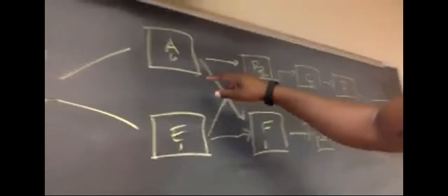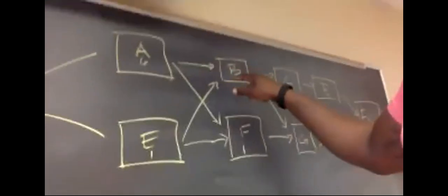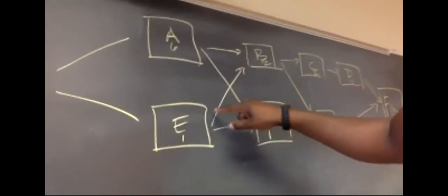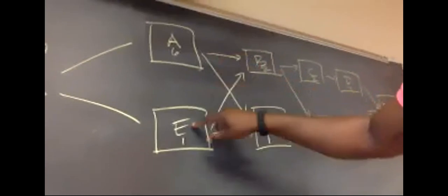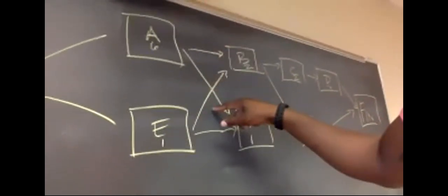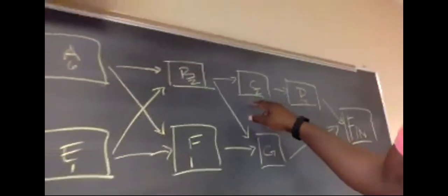So we got start to A and start goes to E. All right. Okay. So then remember, we follow the chart. B comes from A and E. So we draw B, and its predecessors are A and E. So we got to have a line from A and E. Okay. Then we go to C. The only reason I have E at this point is because I know E also has a predecessor of start.